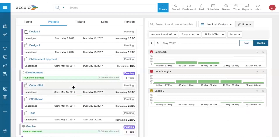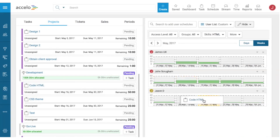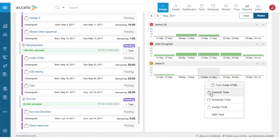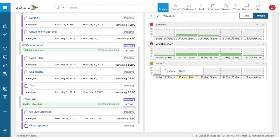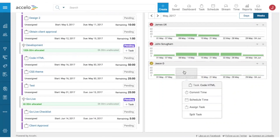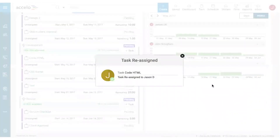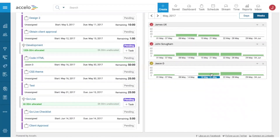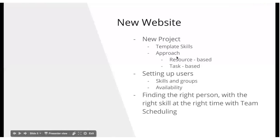From May 16th to May 30th, James and John currently have work on their plate, but Jason looks fairly free. All I do is drag and drop the task from the left-hand side onto Jason's calendar and assign it. The system automatically goes back to the original project plan dates — May 16th to May 30th — regardless of exactly where I drop it on his calendar. That's how you find and assign the right person at the start of a project.